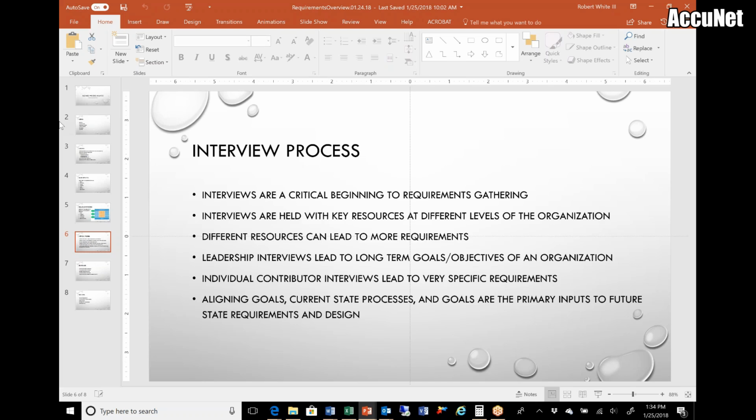Versus agile, you're going to do use cases based on each scenario. And each scenario could be a screen, could be a button, could be whatever it is. You're going to, throughout the project, build and test each of those use cases and verify with the customer. Then at the end, you're going to compile those requirements and compile those development efforts to a final product that then gets signed off.